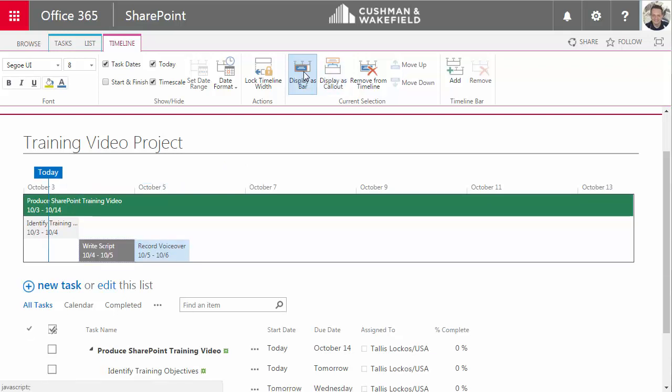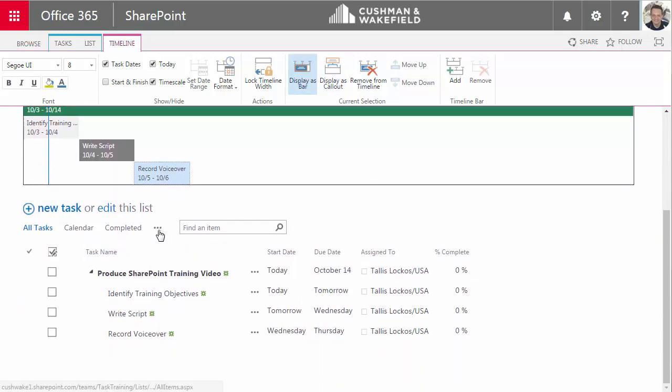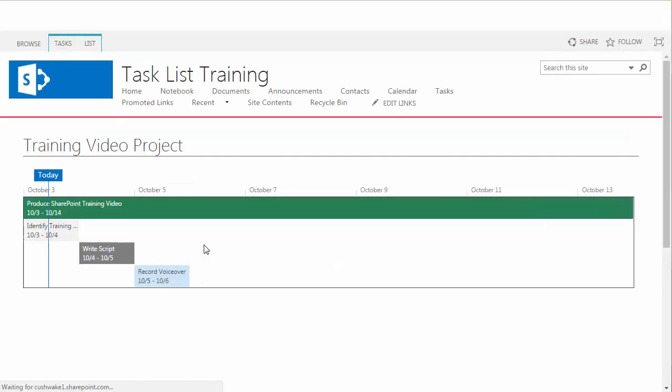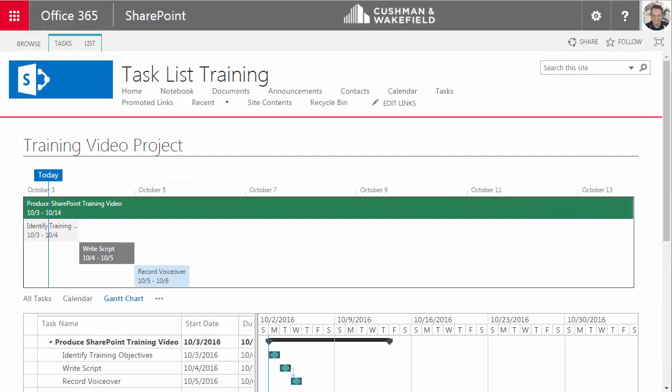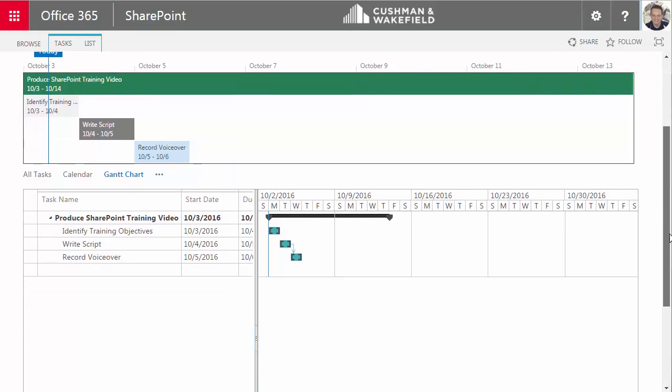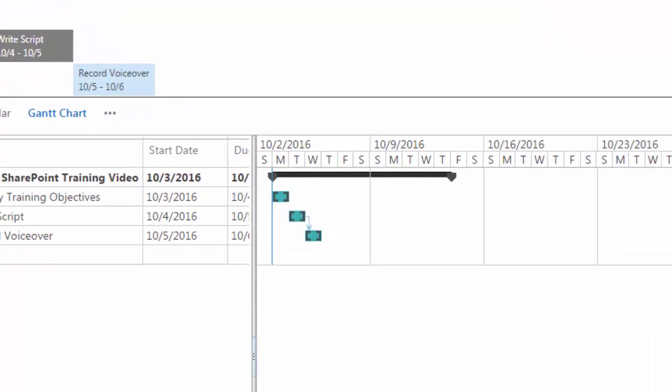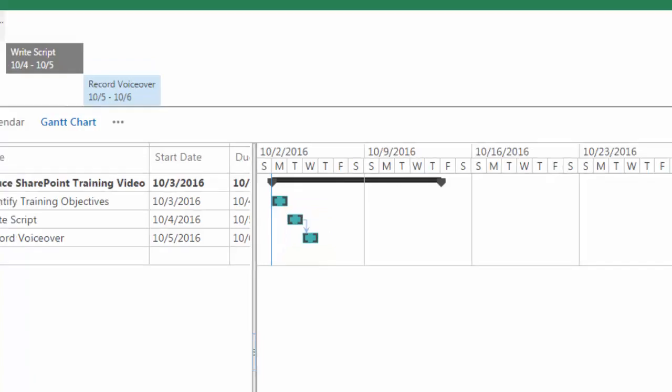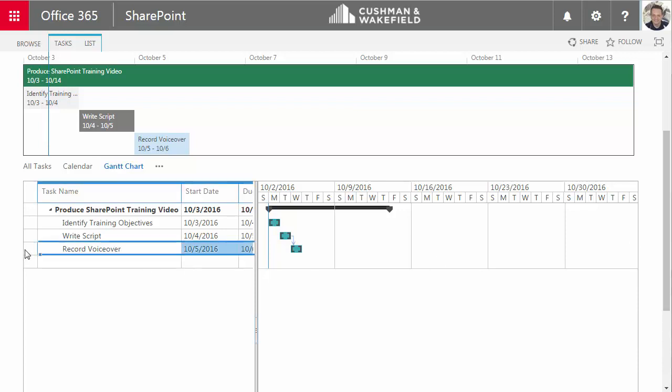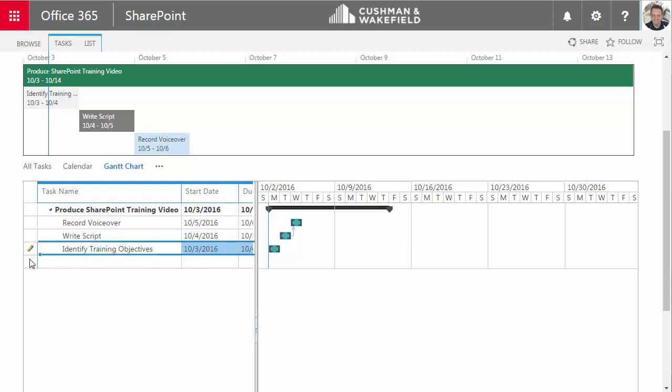So SharePoint has some other built-in views. Here's the Gantt chart view. And now I have a Gantt chart view below the timeline. The arrow here is referencing the predecessor task or that prerequisite task that I set up. I have to write a script before I can record the voiceover. I can click on an item and move it up and down if I want to organize these tasks in a visually different way.